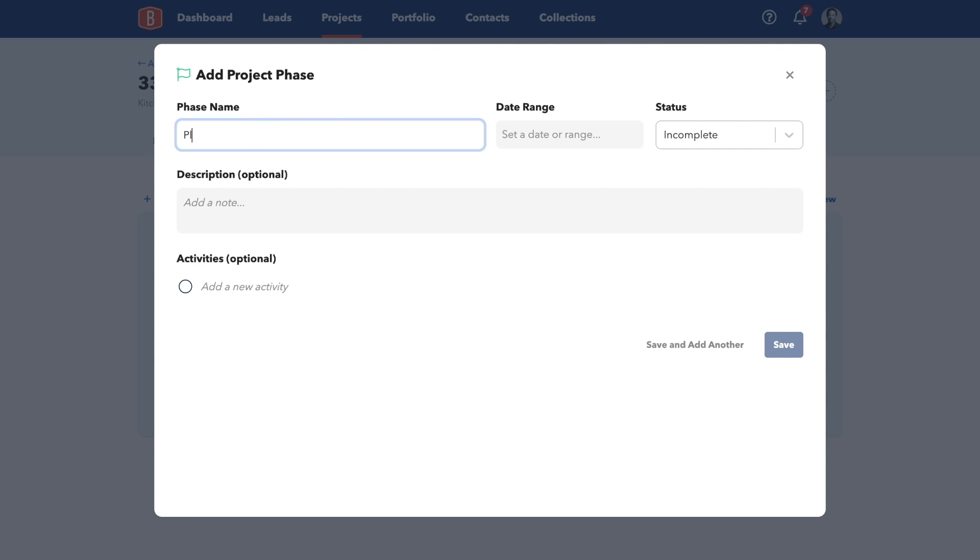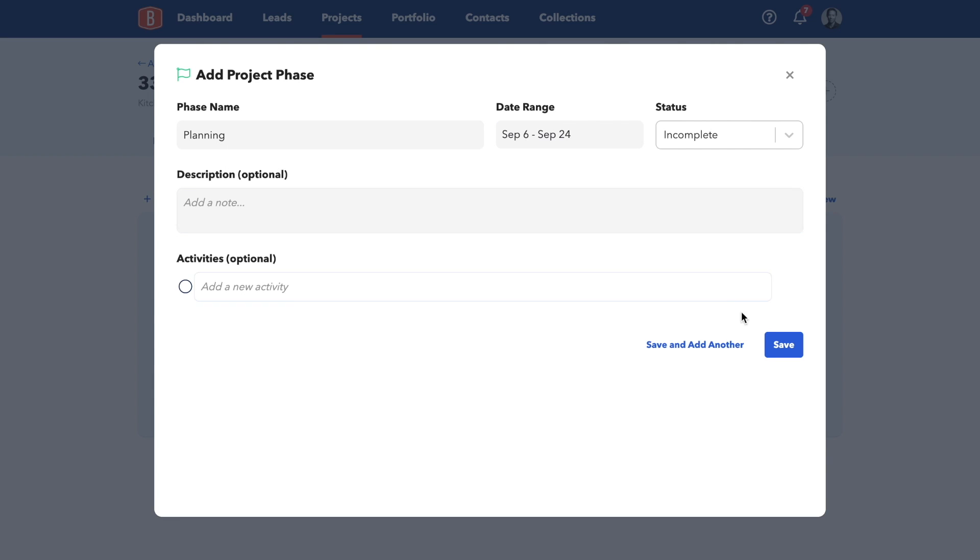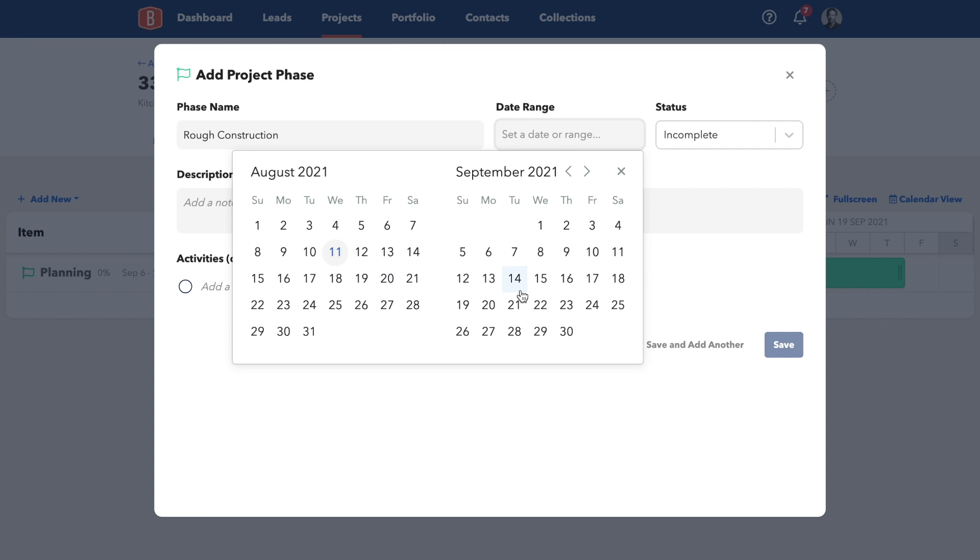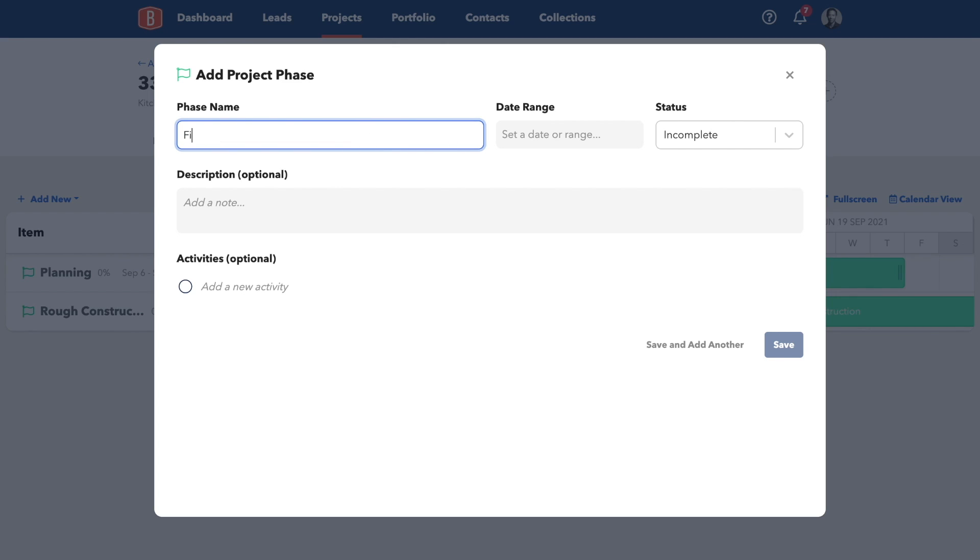I'll add a planning phase to cover things like design, client selections, budgeting, and sourcing for ordering all the materials. Next, I'll add a rough construction phase, and lastly, a finished construction phase.